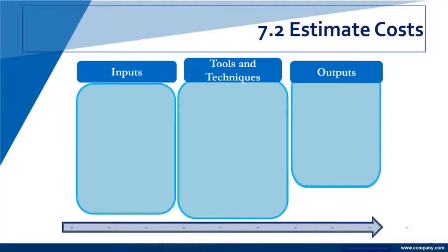to here. The inputs are the cost management plan, the resource management plan, the scope baseline, which says exactly what it is we're trying to accomplish. What is it we're delivering? The project schedule, which we should have in hand, which says we're going to do it in this time frame. The risk register. We haven't talked risk yet, but we should be dealing with it. Remember, we're not linear. Some of the areas that we talk about here are not part of a linear process. If we put it in a linear process, it would be complicated and confusing. So we're dealing with the risk register.